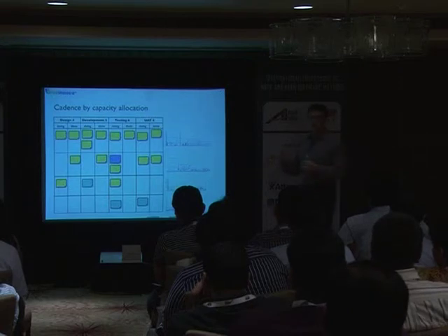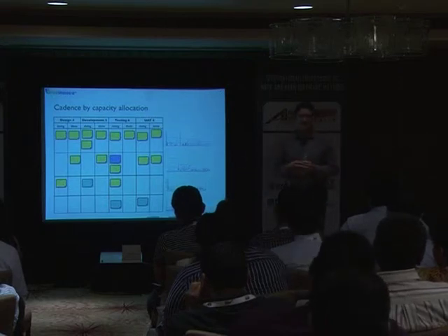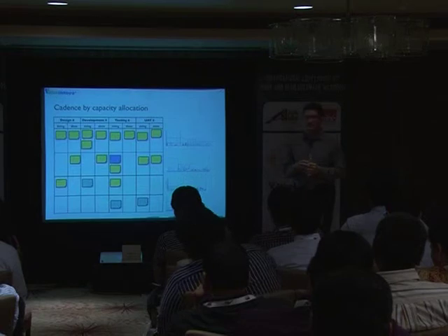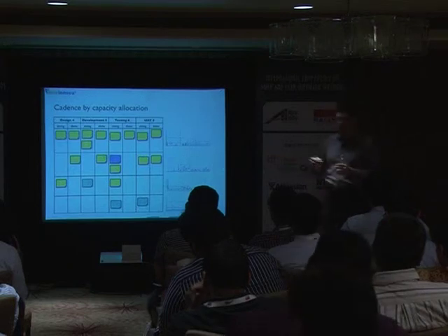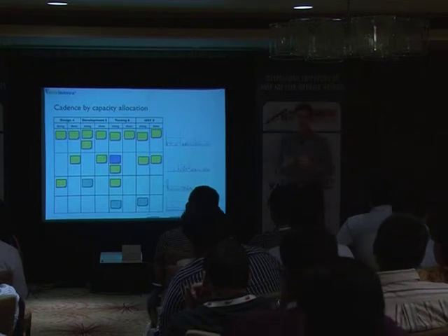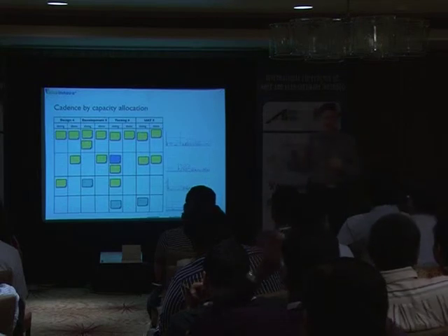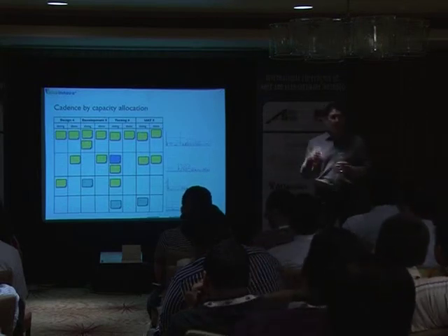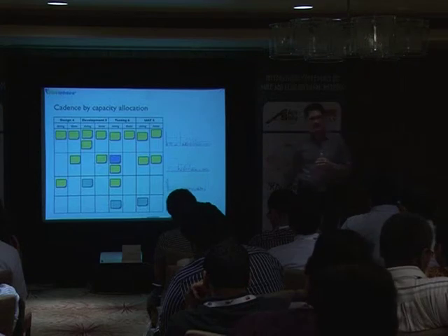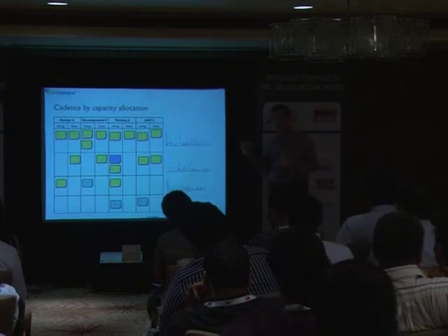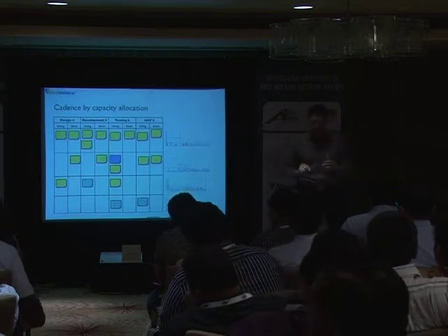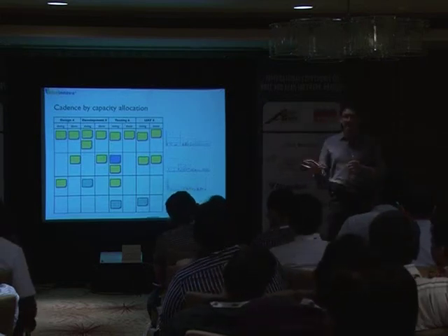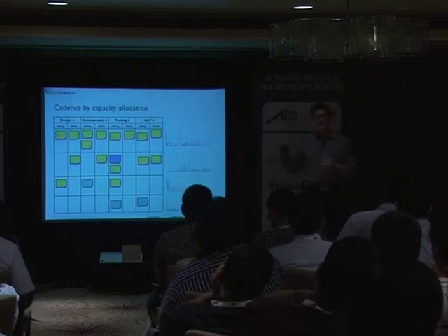Well, instead of being treated ad hoc, as usual, we could establish a discipline behind it, which would be something like, if an urgent task comes, what we have to do is look at it immediately, determine what needs to be done, pull out the resources that are necessary in the order that is adequate, keep a log of that behavior, and we quantify. And then at the end of that, once we finish and deliver that solution, that's not the end of the story. We're going to do root cause analysis.